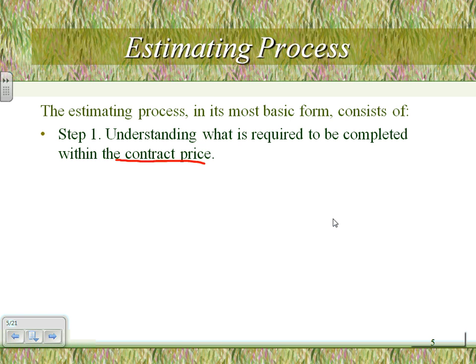What is part of the contract? If the customer wants you to add more, no problem, we'll do it for you, but for a price. Adding one receptacle, guys, to the 10 receptacles that the owner wants you to do, not a big deal. Adding another 4, it's a big deal. We need to spice it up a little bit. We need a change order. What needs to be done?